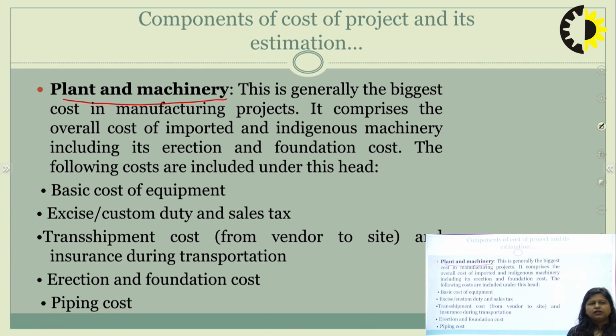So this is generally the biggest cost in manufacturing projects. Sir, for the service industry, we need not purchase machinery. We need not develop the plant. But for manufacturing projects, this is a head which incurs a huge amount of investment. It comprises the overall cost of the imported and indigenous machinery, including its erection and foundation costs.